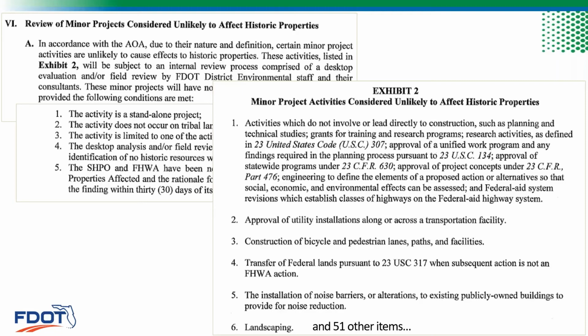And keep in mind that the condition about cultural resources in your APE, the language is historic resources. You can't have historic resources within the APE, not historic properties. So that means just anything historic, regardless of its significance. So it's really key to define proper APEs early on.